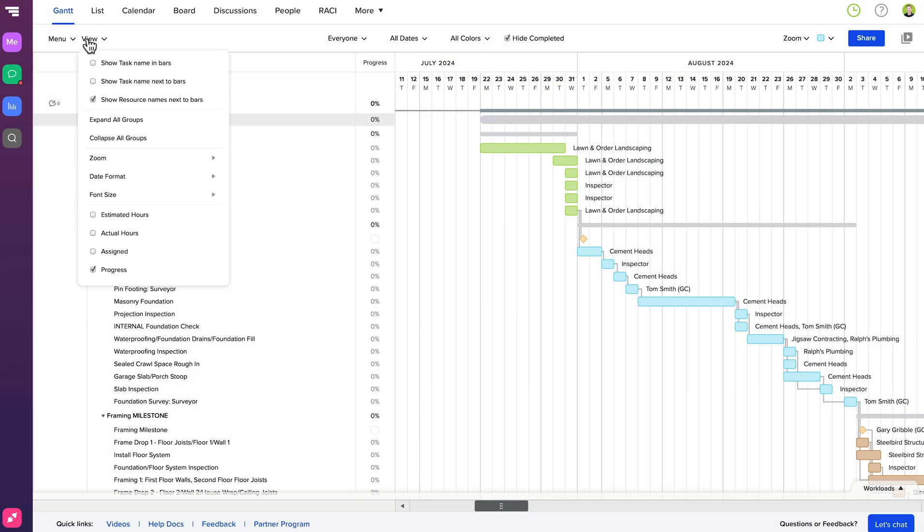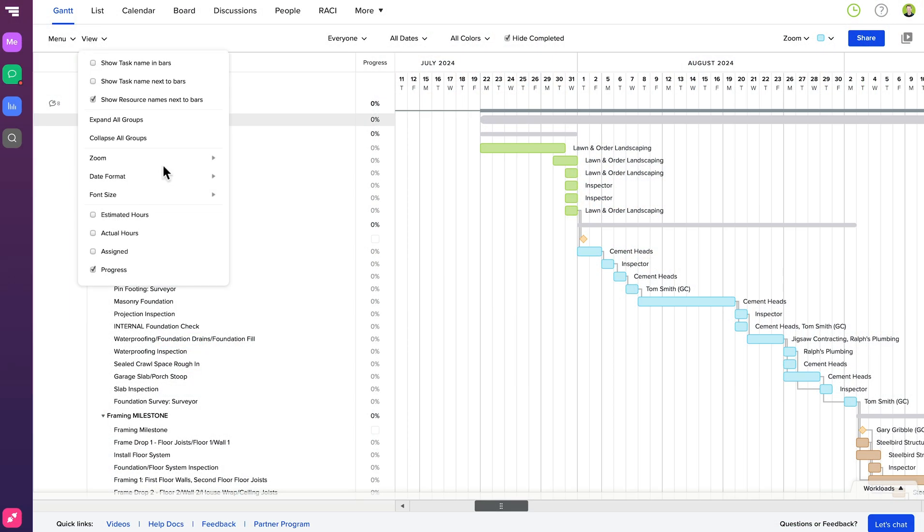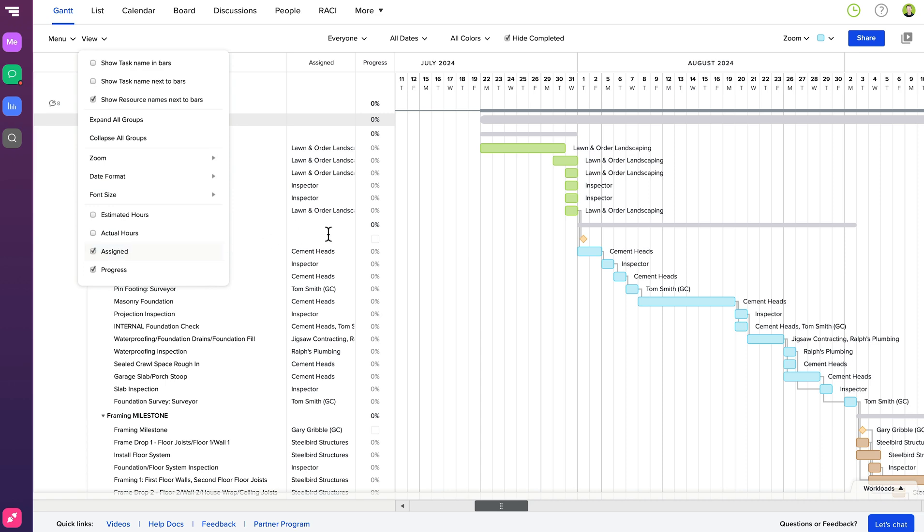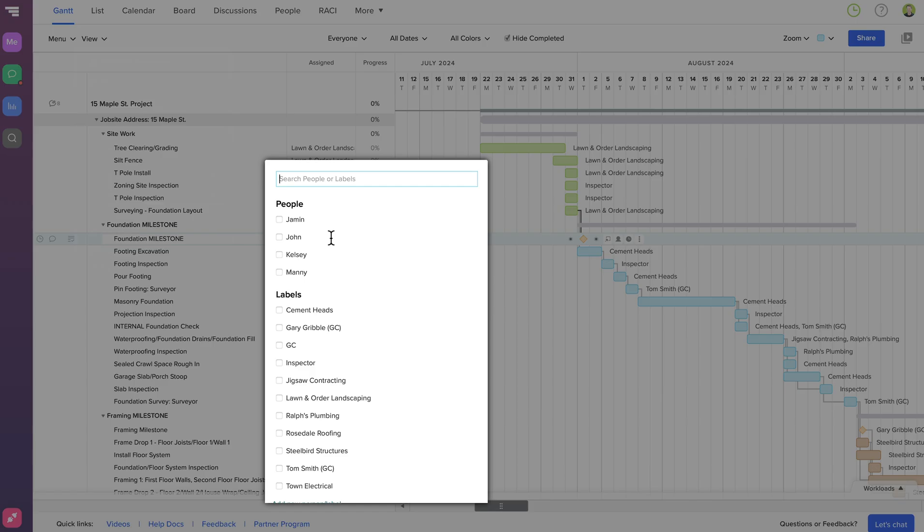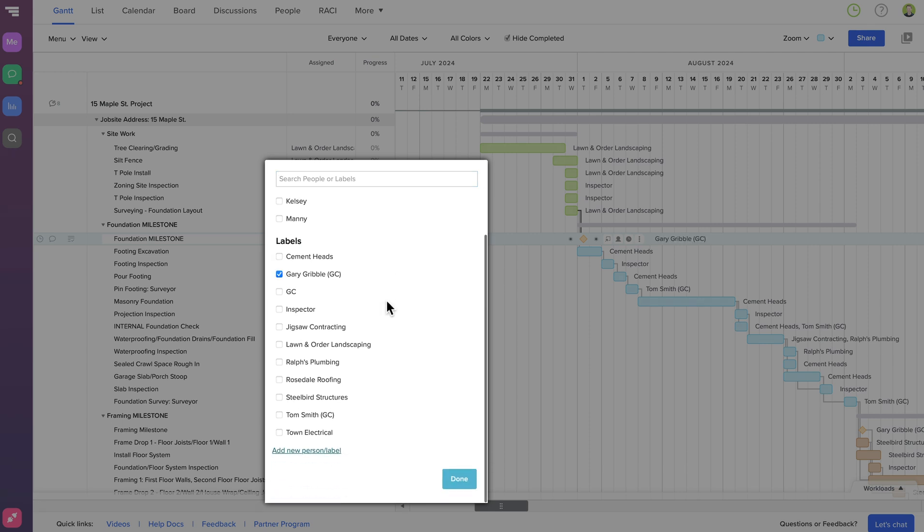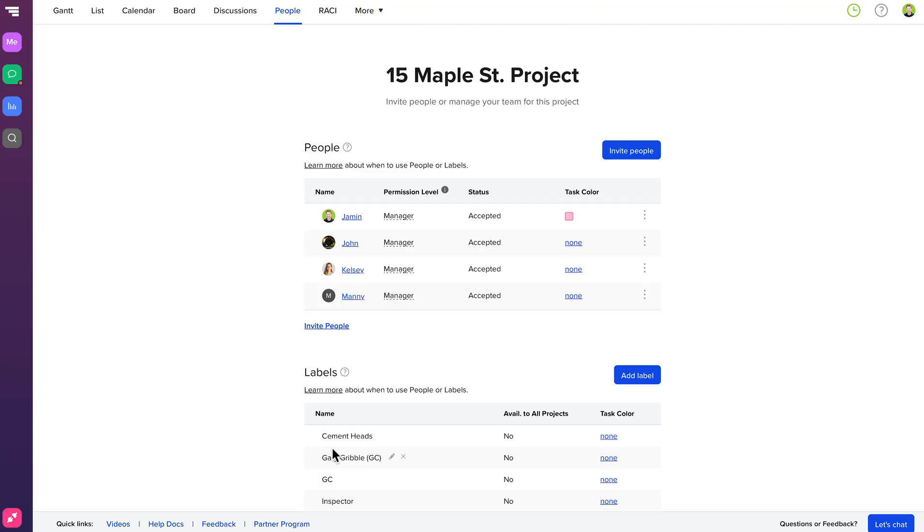You can also assign all resources from your TeamGantt project schedule to users in Procore. When you create a project schedule in TeamGantt, you can easily assign resources, otherwise known here at TeamGantt as labels, to your project by clicking in the Assign column and assigning one of the labels you've already created, or create a new one by clicking Add New Person slash Label.